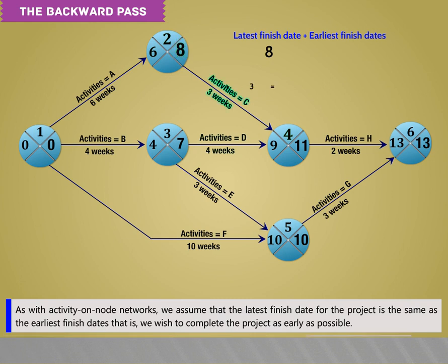As with activity on node networks, we assume that the latest finish date for the project is the same as the earliest finish date, that is, we wish to complete the project as early as possible.